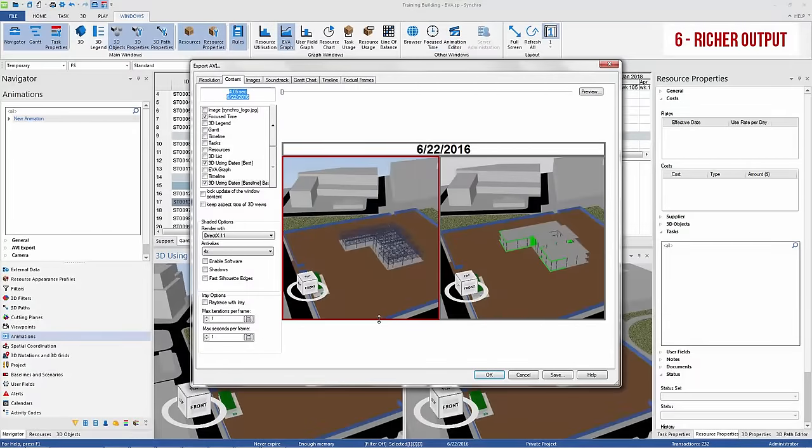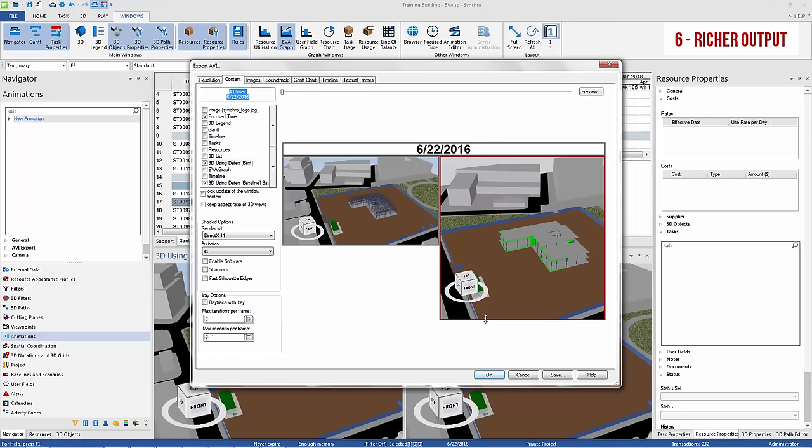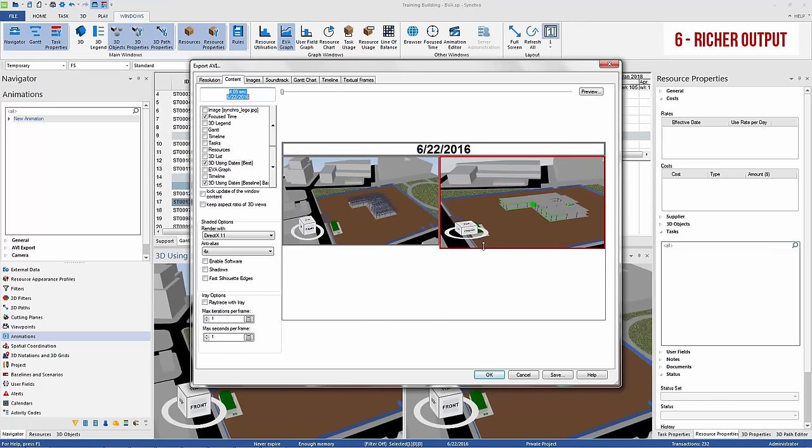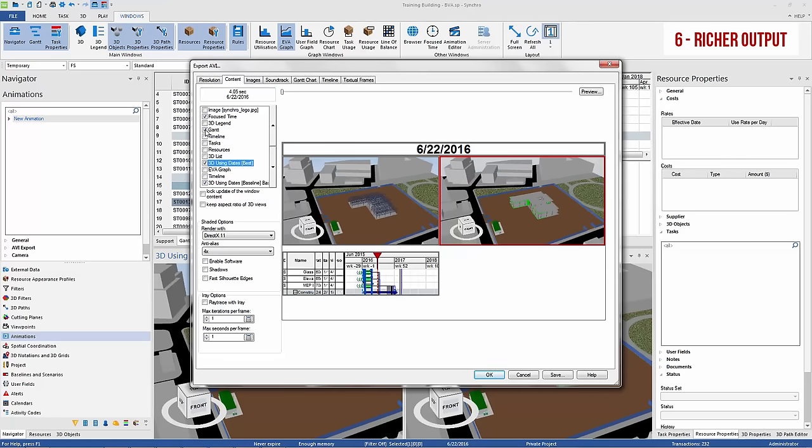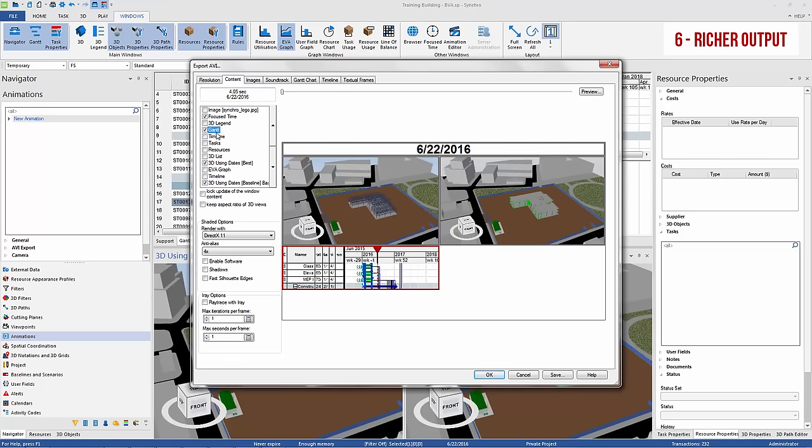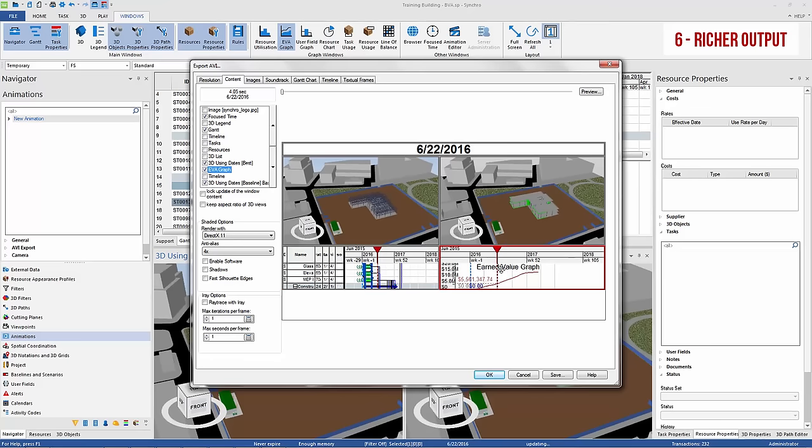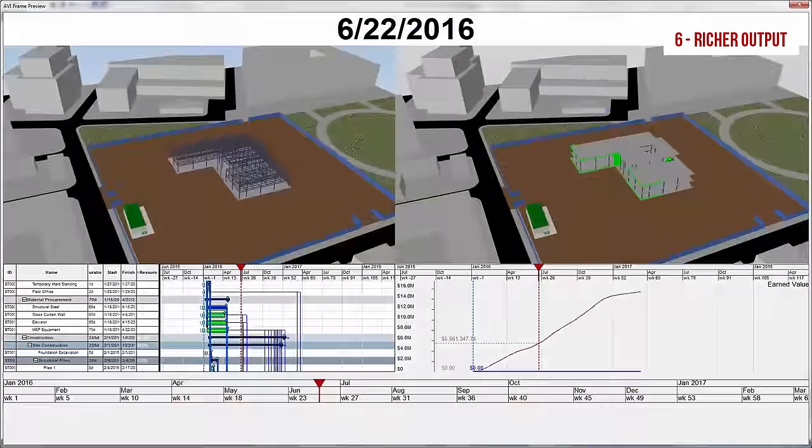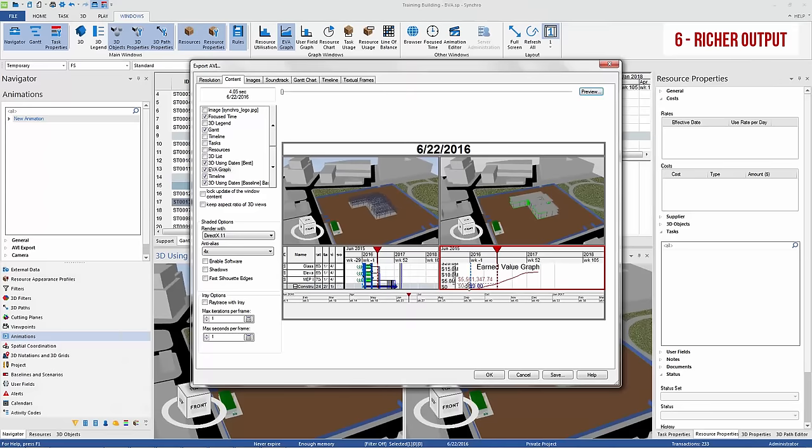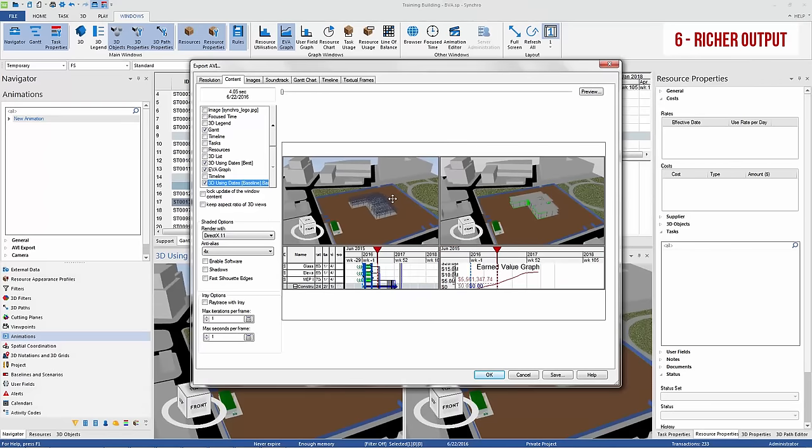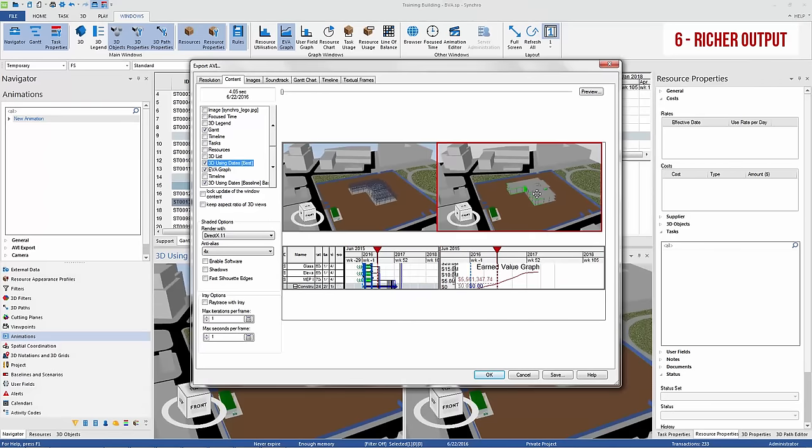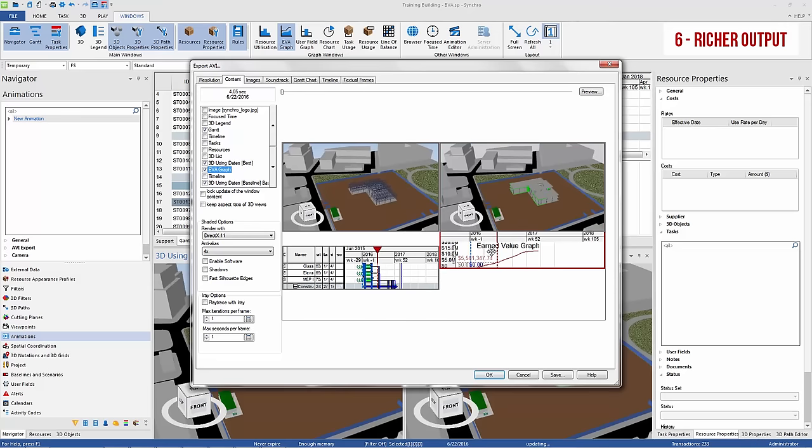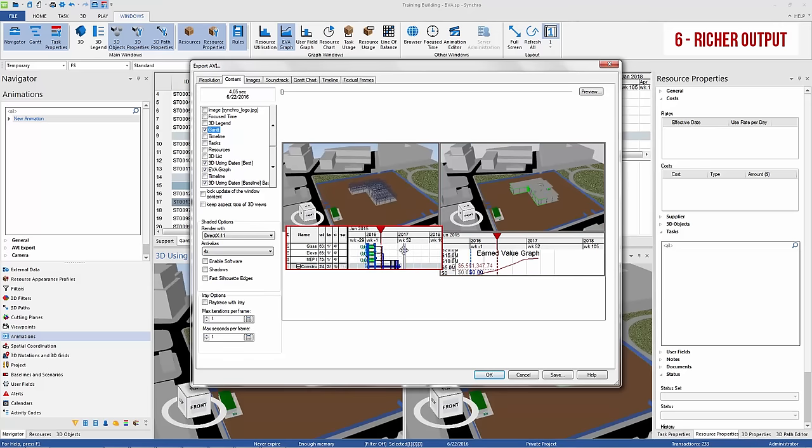Speaking of output, Synchro's animation exporter allows you to create custom layouts that can include the Gantt chart, earned value graphs, user field graphs such as the concrete histogram, as well as multiple views with different filters. This enables much more informative 4D output that is simply not possible from Navisworks Timeliner.